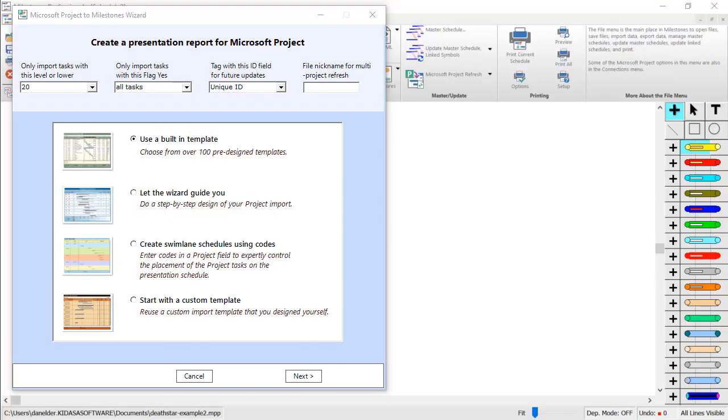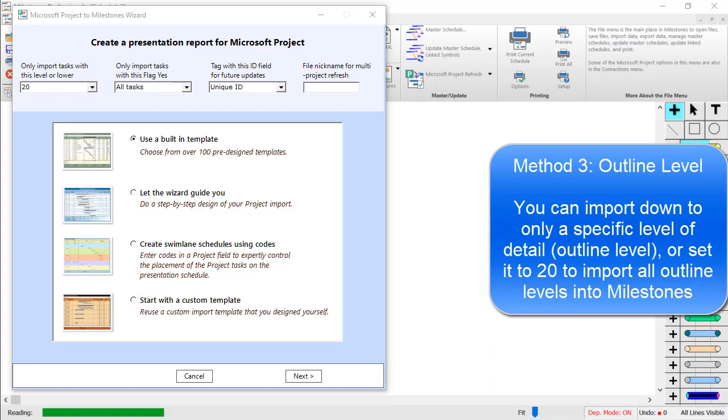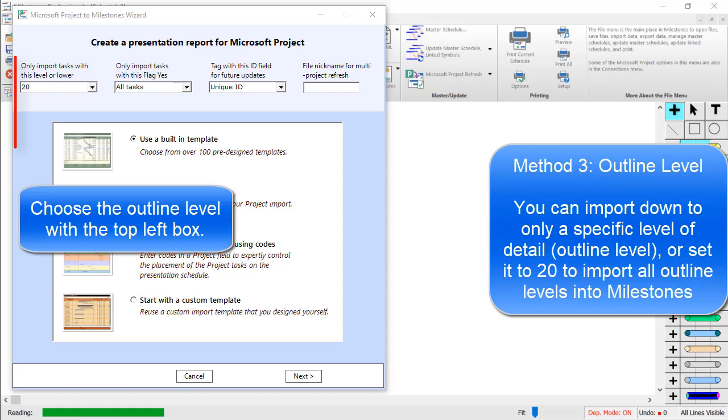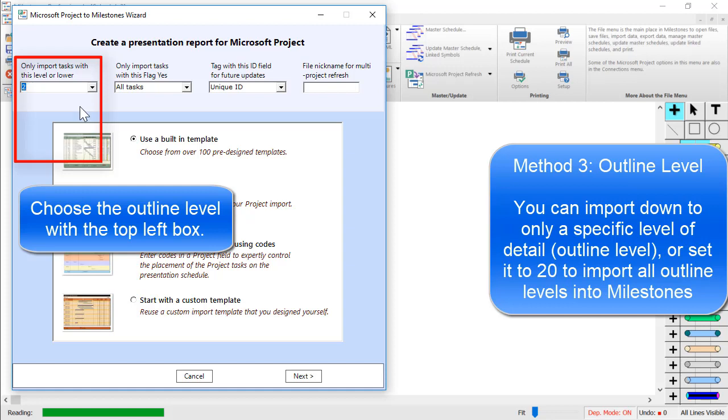The final method is also on this import screen. The top left box is an outline level filter. For example, if I only wanted to import outline levels 1 and 2 from Project, I would choose 2 in the drop-down. The default, 20, will import every outline level from Microsoft Project.